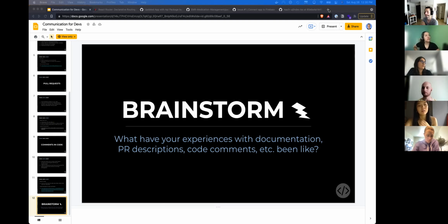At my last job, we used the Jira tickets, the actual story cards, as the place where we would log all of the conversation, any back and forth about decisions that we were making, or if we had to do some research to dig into the code base and figure out why something was happening, we would use the actual story as the container for all of that conversation, so that in the future, when you're trying to look back on it, there's a place where all that information is captured.